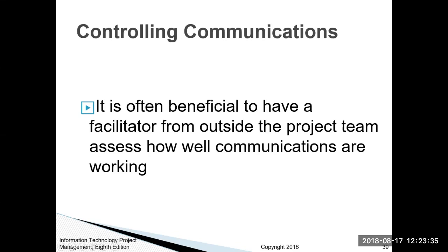And so this is where you use these outside people, these stakeholders, to come in and give their opinion, because sometimes you may be looking at things from such a technical aspect that you don't look at the outside factor and how it may affect the community. And so a lot of times in those instances, we would find out that if we were going to be doing road construction or putting in a new ramp or increasing the flow of traffic, where you're going to have a lot more vehicles on that particular area of the road, we would have to reevaluate and come back and say, all right, now we need to do a sound study, because with the increase of traffic coming through that section of road, the noise level for those people living in the community is going to be affected, and also maybe the fumes from the vehicles could make people sick.